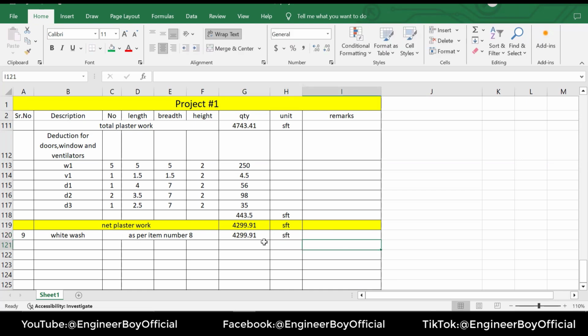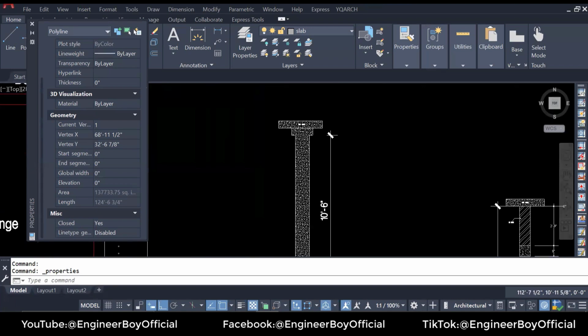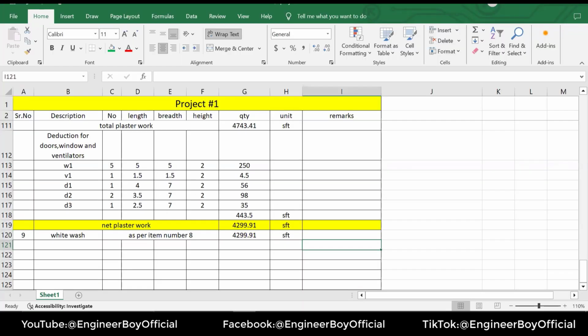However, the column can be included over here, okay? We can just add the column, because a column can be whitewashed, and that is 2 by 2, and of course the height is just 11, okay? So that's 2 by 2, very simple, and you can include that above or below that, so you can have the total, okay?